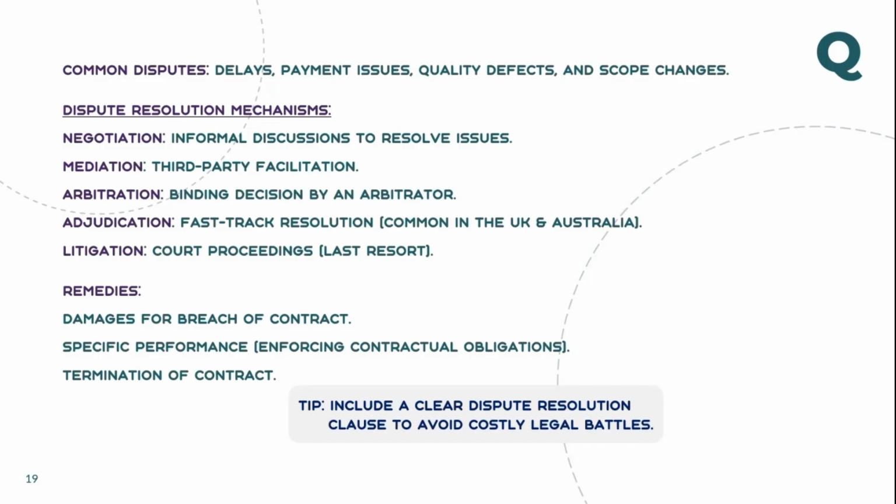So if you put litigation as the dispute mechanism, you can tell them, see guys, we keep dispute resolution as litigation, and I think that's the adverse mechanism. In my view, as a contract administrator, you would say to your client that I know litigation is the mechanism, but I think we have to consider some alternative non-adverse mechanisms like negotiation, mediation, conciliation, or expert opinion, because that will eventually help us resolve matters in good faith and with a fair deal.